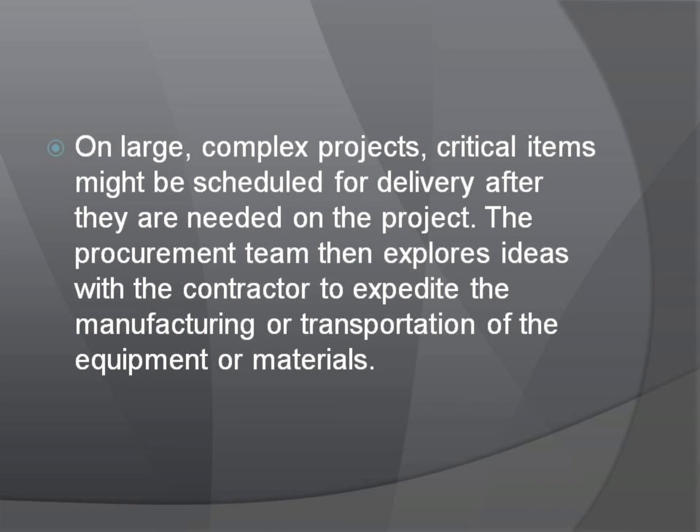The project logistics team can also explore ways of shortening the transportation time. For example, a project in Argentina flew some critical equipment from Sweden rather than transport the equipment by ship, to save several weeks in transit. The logistic costs were higher, but the overall value of the project was greater.